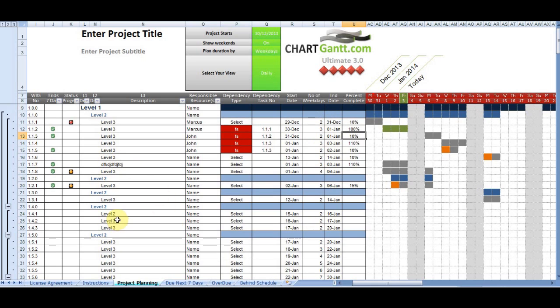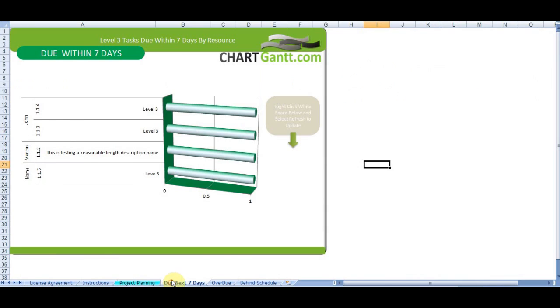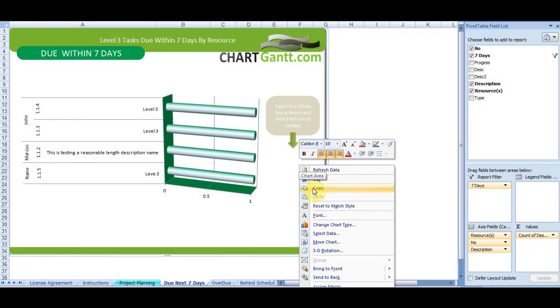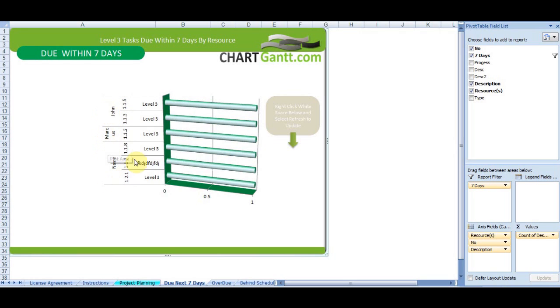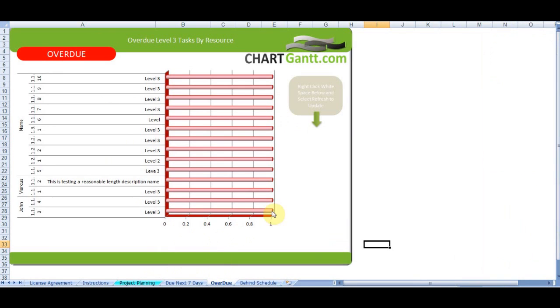So having a look at some of the reporting features now. If we go to tasks due within the next seven days, to update that report, all we do is click refresh data. And we've got it. There's our DFD task I just created earlier. This report is by name. So who's the resource? What's the task number? And what's the task description in relation to that?